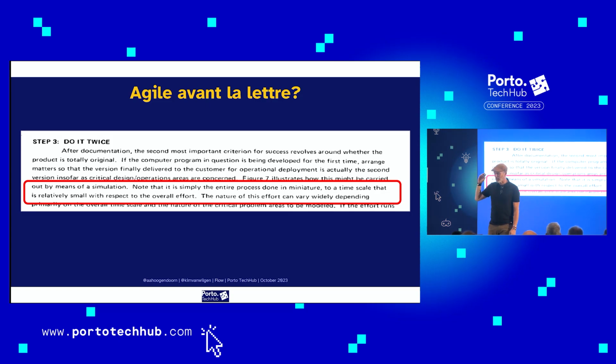He actually says, well, these activities are okay, but you should do them in small slices, right? Do a bit of requirements, a bit of analysis, some design, some building, testing, you go back and back and back. And you might like, wait, we know this stuff, right? This is called agile. In 1970, right? What did we do in the 50 years in between? Well, we failed at really big projects, basically, in between.